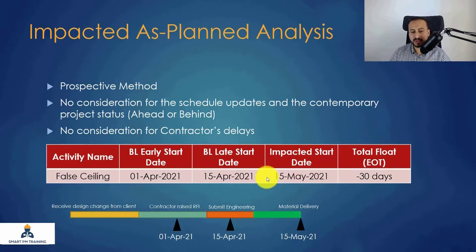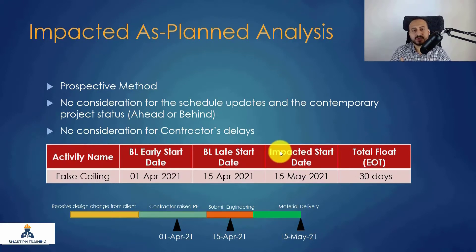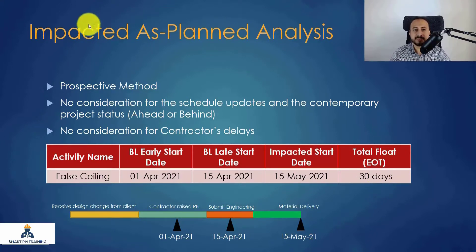Because the client delayed me by one event, I actually started on May 15 — one month behind the late start date. Being 30 days behind the late start date automatically gives a total float of negative 30, because we are using the baseline schedule. The impacted start date is actually the actual start date, but we use 'impacted' in claim vocabulary. So the negative 30 will be the full EOT entitlement.